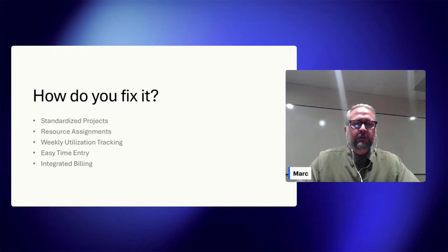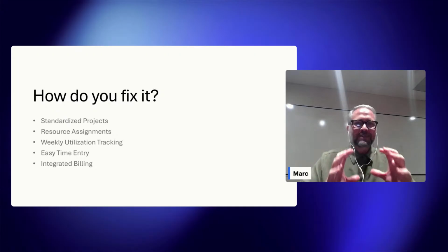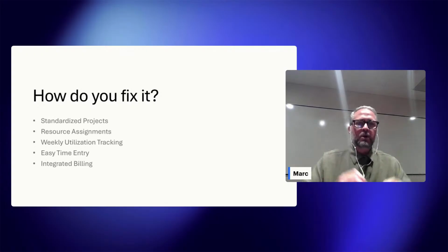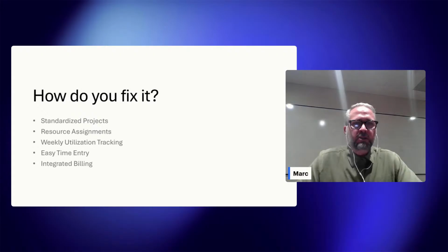Resource assignments, so typically assigning specific projects or project tasks within projects to resources. We don't really recommend splitting project tasks across resources. You typically get better utilization with a single thread. But that resource assignment process should be part of a PMO process each week.